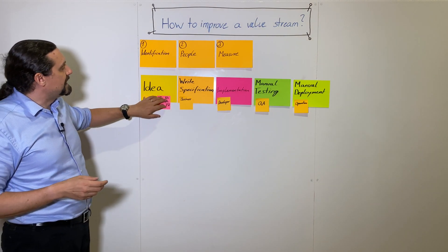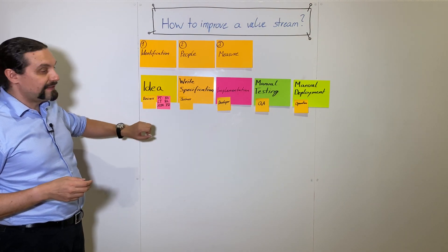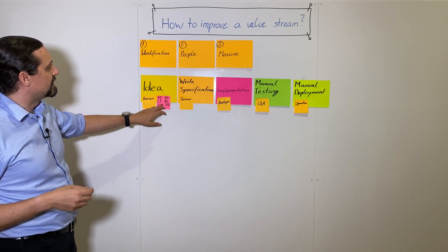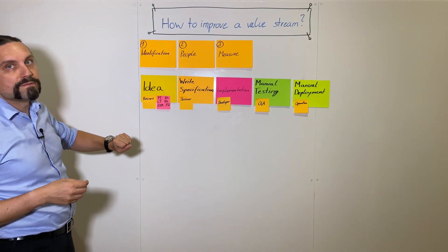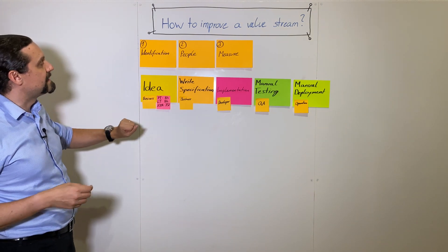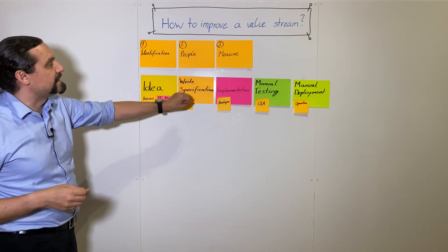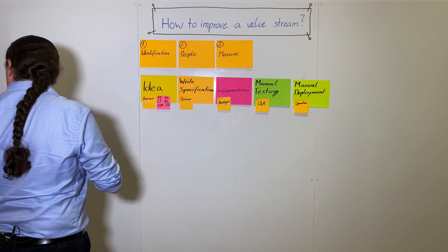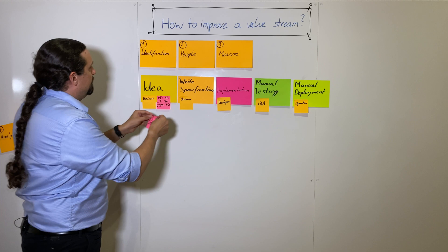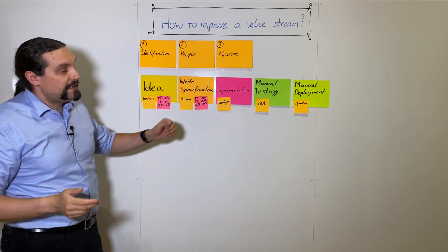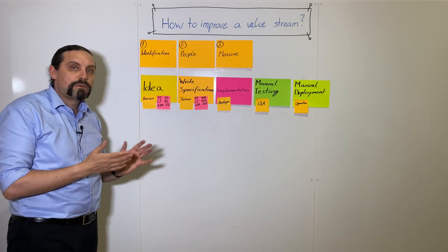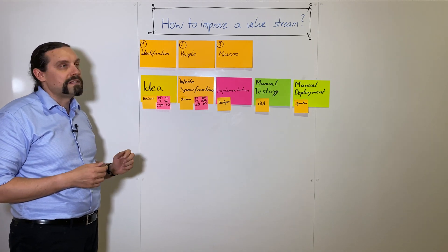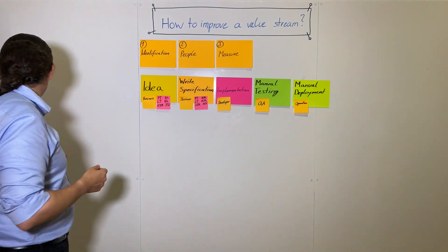For the idea step we have a process time of eight hours, lead time of eight hours, and roughly a percentage completed and accuracy of 75 percent — which means in 75 percent everything was okay, but in 25 percent it was not. For writing the specification we have a process time of 40 hours, a lead time of 80 hours, and percentage completed and accurate of 50 percent.